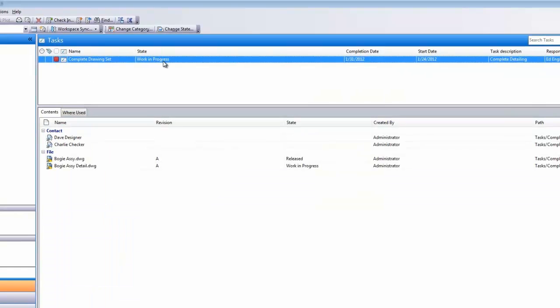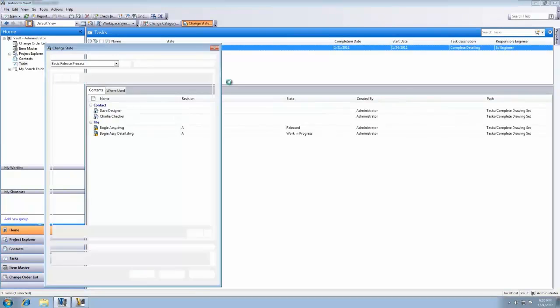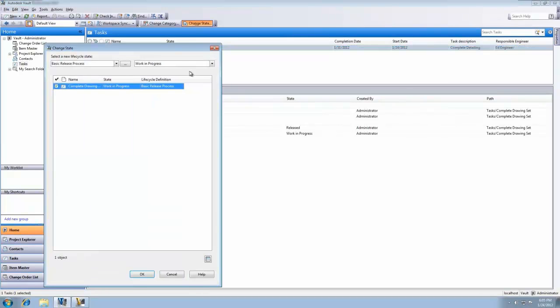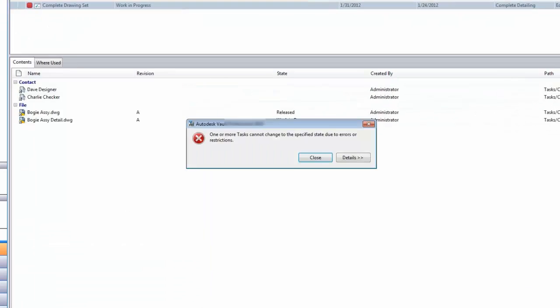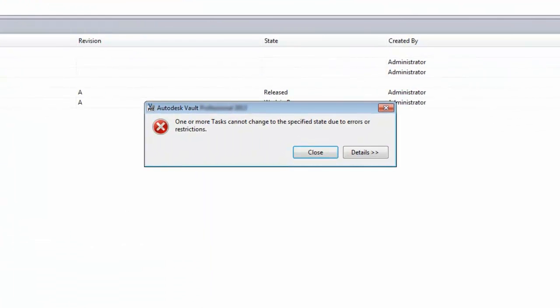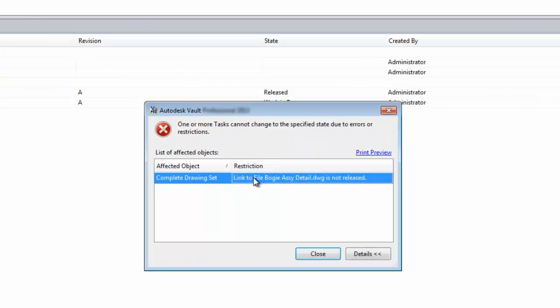We've located the work-in-progress object, and we'll try to change its lifecycle state to complete. Because we're taking advantage of transition rules in our custom objects, we get an alert indicating that all linked documents need to be released in order for the task to be complete.